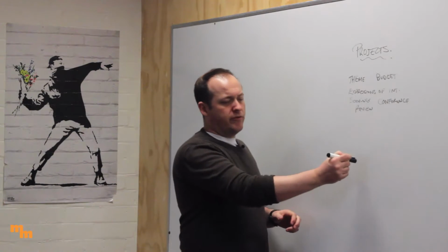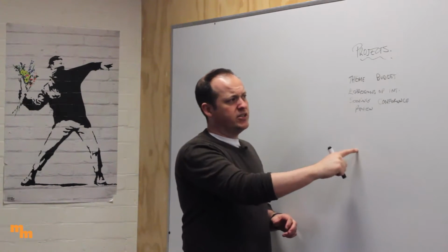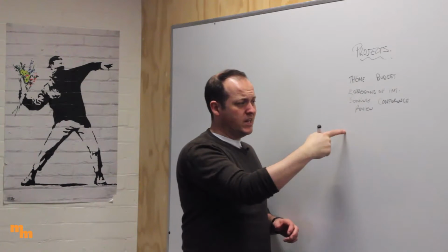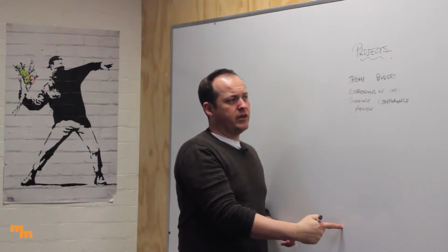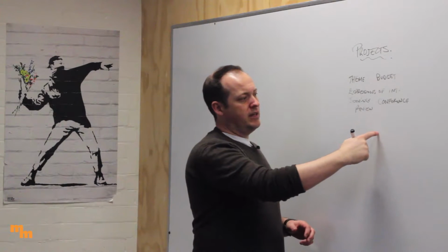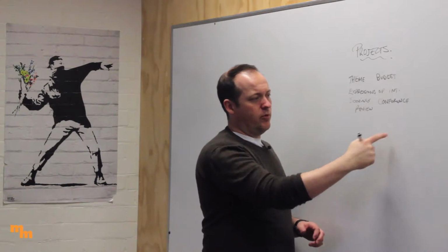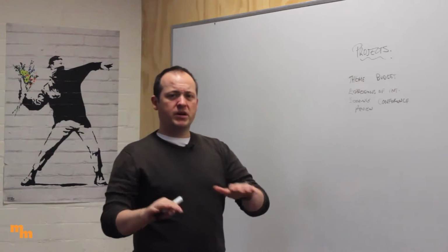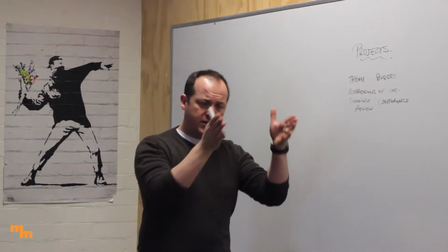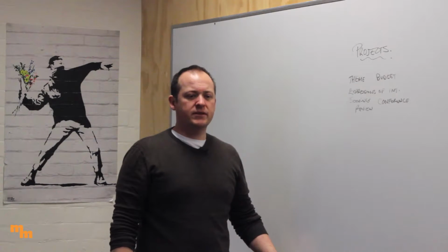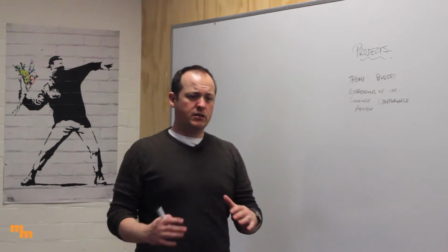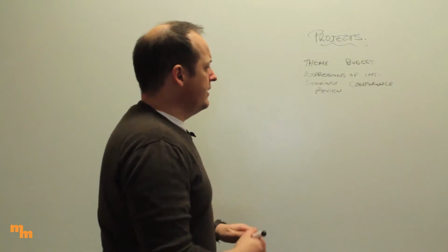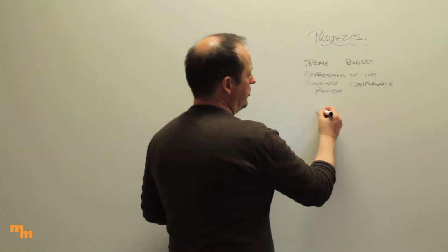So someone who makes all the phone calls, all right? So communications or conferencing or bookings. Get one person, bookings is a big headline task, and they will do all the bookings from all the different elements. If I need to think about my budget setting, make sure I put all the budgets together and come up with a master budget. Right, what we shouldn't have is little bits and pieces everywhere, but a few broad headings, and underneath that, all my different tasks. Okay, so macro, big picture, and then small. Once I've got all my bits and pieces together, I need to just lay everything out in a logical order.